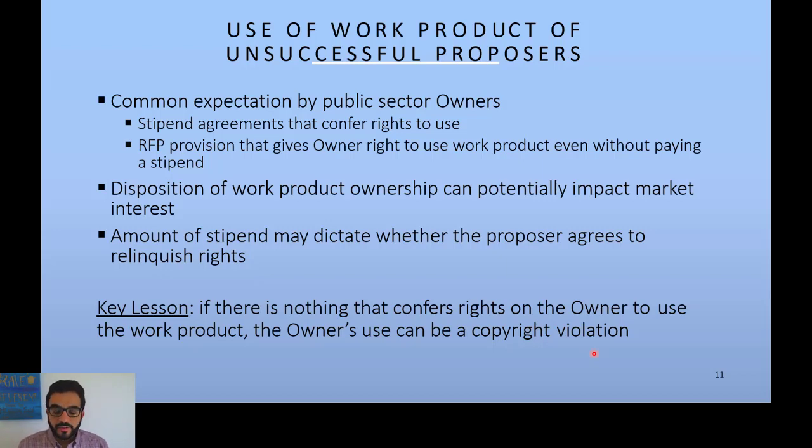The bad thing about this is if you require that, you will lose interest gradually from the industry to submit proposals to your projects because they don't see a value. You're stripping them of even the right of confidentiality and proprietary right of their products. Whatever they design for your project ends up used by their competitors, and that makes them lose interest in your agency and your projects. And the amount of stipend that you offer might affect that also. So it's kind of give and take.